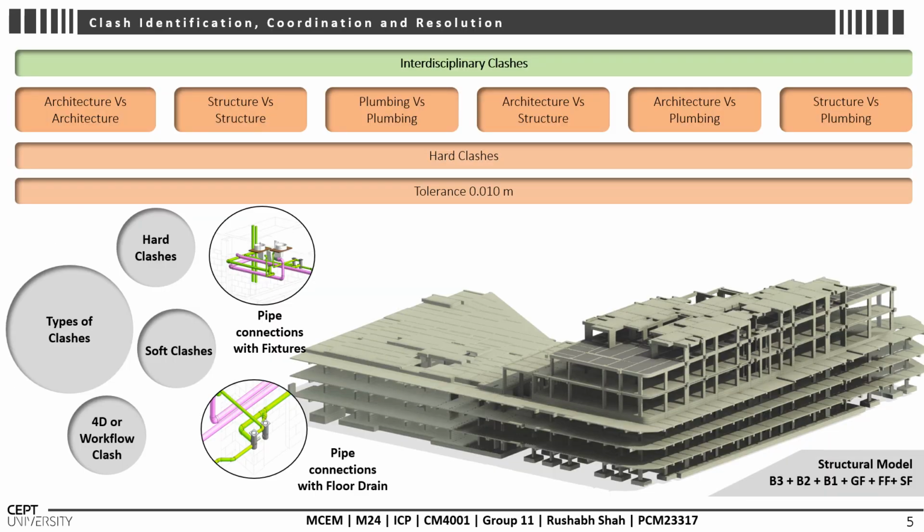This is reinforcement details, the glass door, the material storage and contractor office are shown here. After conducting the interference check in Revit, our next assignment is clash detection in Navisworks. We tested clashes between interdisciplinary and intradisciplinary models, shown on the slides. Other than this, we also did clashes between architectural versus MEPF models and structural versus MEPF models.